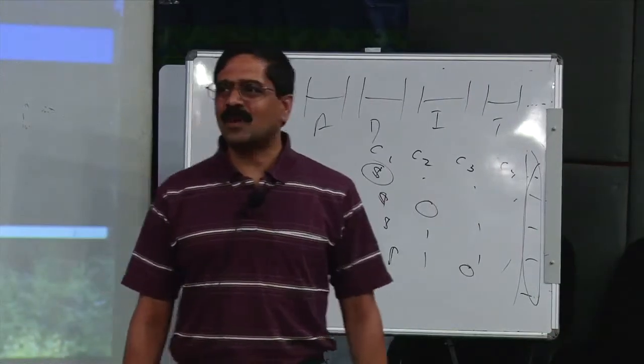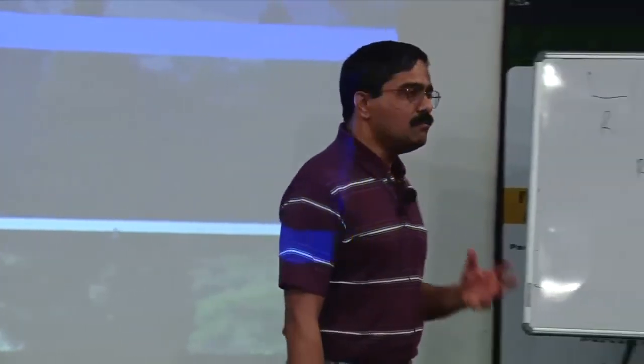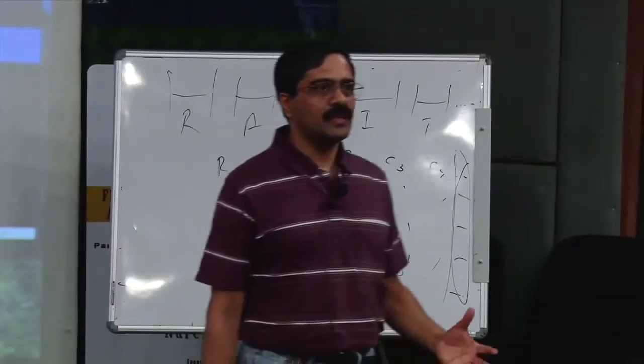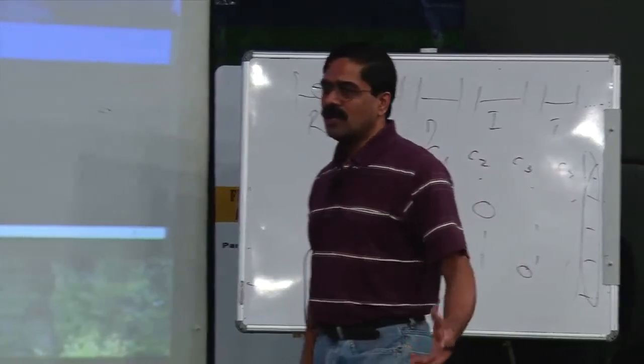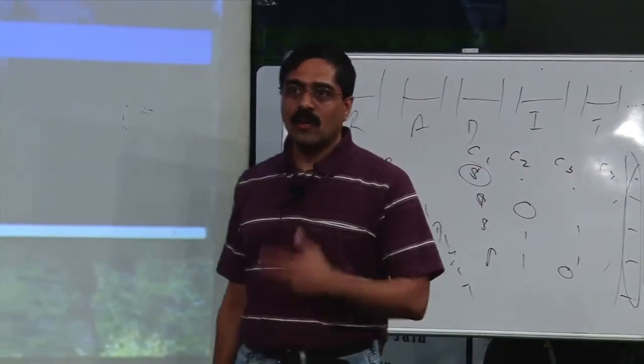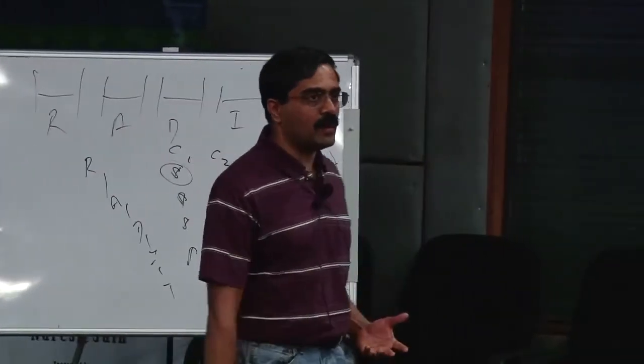You show something and they're like, well, that's not what we really wanted. Hey, but your requirements document says that's what you wanted. Well, that's not what we meant. This is called the observer effect. Observer effect is, the minute you observe, you want to change it. You no longer want what was told, you want what you want now when you observe it. So observer effect is something we have to be very careful about.